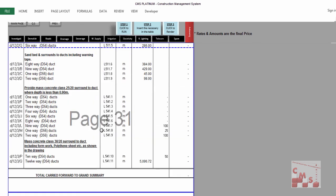Any activities or items with no rate or quantities will be removed automatically from the rendered BOQ. That's how CMS deals with infrastructure — it gives you a full ready BOQ; just insert the quantities, and when working on cost estimation add your rates including overhead and profits. See you in the next video, thank you and goodbye.